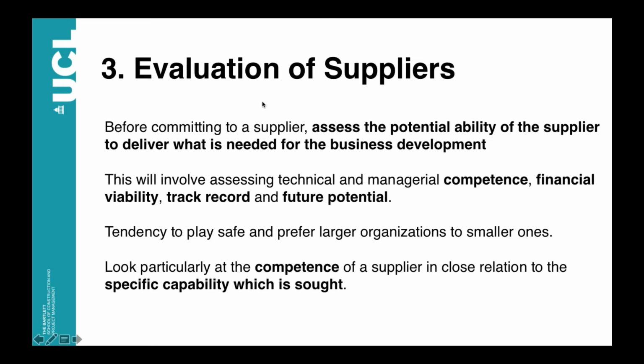A third step in that process is the evaluation of suppliers. Before committing to a supplier, we need to assess the potential ability of the supplier to deliver what is needed for the business development, what is needed for our project. This will involve both technical and managerial competence, but also financial viability and track record.